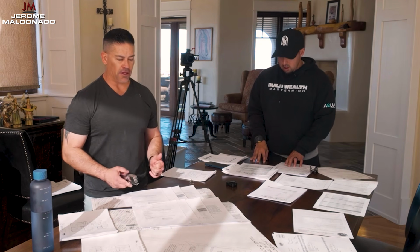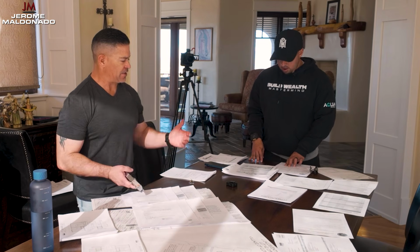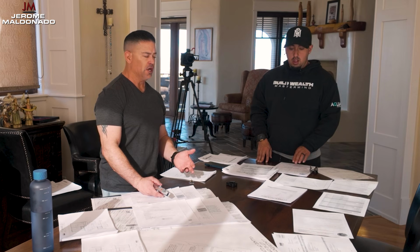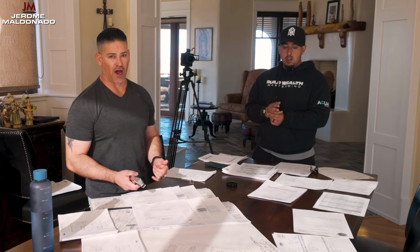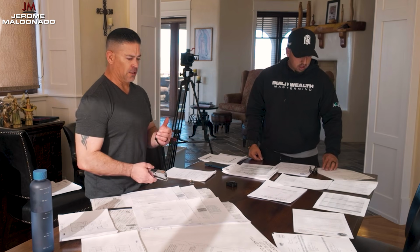Because at the very least, now we go in, we get our plans reviewed. And by the time they come in and they notice and recognize that that deed is the prior owner's, we'll have the original deed because we will have closed on the actual loan, and our plans will already be halfway through plan review, saving us weeks, if not months of time in the plan review process. So I told Alec, just print the existing deed, let them call it.